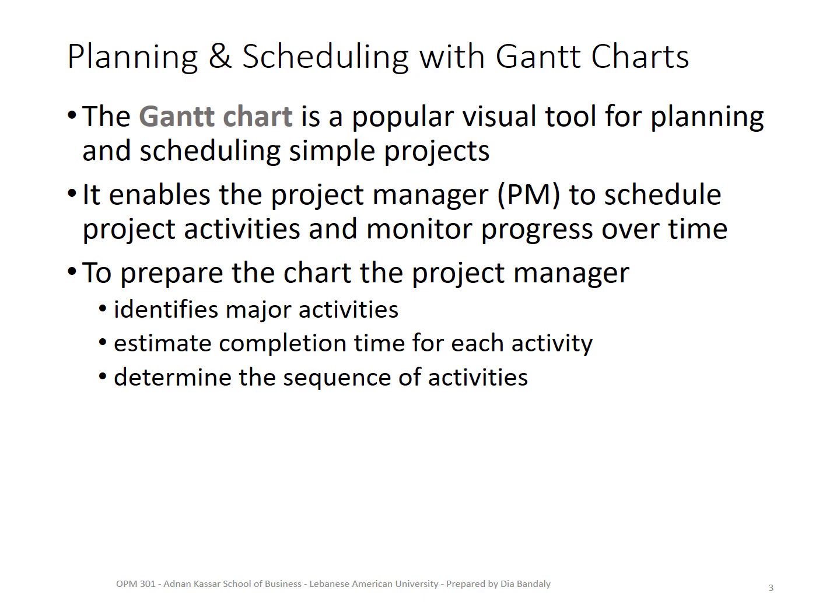It shows the project manager all the activities. It has a list of the activities on one part, and then on the other part, which is the main part of it, it shows the duration of each activity in a bar format. I'm going to show you; we're going to do an example soon. So the project manager, every morning when he goes to the office, can see, according to the day on the calendar where we are now, what activities have been done so far, what's supposed to be done today, what's supposed to start tomorrow, etc.